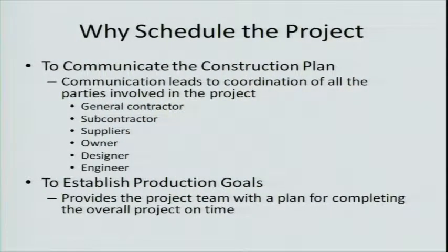Also, it lets us talk to the owner and make sure that we're in time for his schedule. Okay? It talks to our suppliers so we know when they're going to deliver what we need, so we get stuff just in time or before we need it. Talks to the engineers and designers in case we see something wrong when we're putting our plan together on how to construct it, that maybe we need more lead time, or did they take this into consideration because they don't know that there's a lead time that's involved and we have to make corrections to their design drawings.